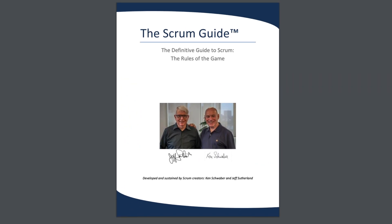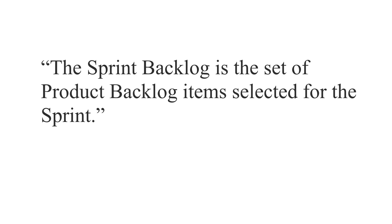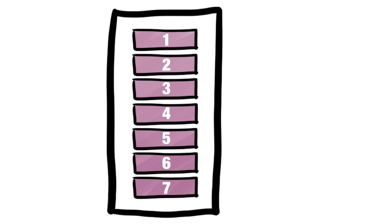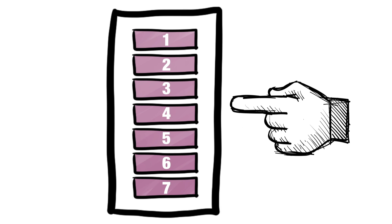Let's just check in with the Scrum Guide. The Sprint Backlog is the set of Product Backlog items selected for the Sprint. Two properties of the Product Backlog and its contents are useful when it comes to selecting items: it's a prioritized list with the most important items appearing towards the top, and the items — certainly those towards the top of the list — are sized.